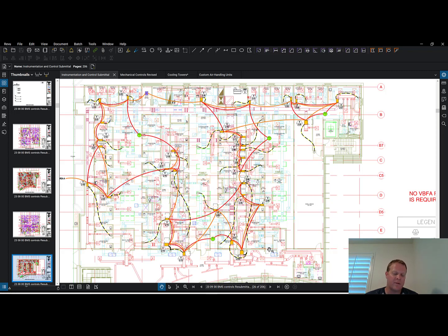Well, it has to be pretty dust free. So the controls contractor is going to be in here doing some work. How much programming can they do before we turn all this stuff on? Well, probably got a bunch of time there too. And so the point being, don't ignore the controls when we're scheduling this stuff. Its work is just as valid, if not more valid, as something that you see, like flooring going down or paint going on the walls or the lights getting turned on. The controls can be complicated. It can be a lot of work to put all the controls in and program it all.